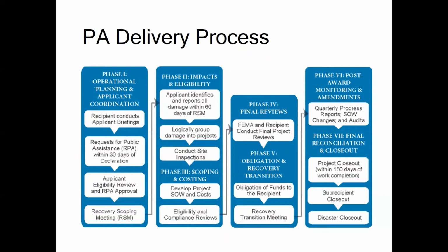Within 21 days of assignment, the FEMA PDMG will coordinate a recovery scoping meeting, or RSM. The applicant should ensure staff with knowledge of incident-related damage, emergency activities performed, and related costs attend the meeting. Each applicant will also be assigned a member of our HSEMD Public Assistance Field Delivery Team, who will serve as your state representative during project formulation.